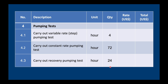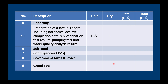The pumping tests are paid per hour. We have a step test of four times one hour, a constant rate pumping test of 72 hours, and a recovery test of 24 hours. Finally, there's going to be a report. Item number six is the subtotal — the total of all the different items above.